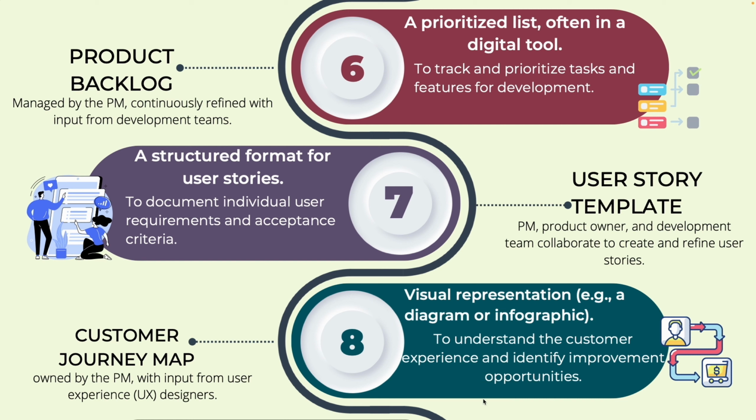Then after that, you'll always come up with now a product backlog. That is always built by the product manager or the project manager with the development team. So here you prioritize the list of all the digital tools, all the features which are meant to be developed. So it's where now we prioritize the tasks that have to come first, and also you give time to the development team to align on what can come first and next, but you always manage the product backlog, you the PM.